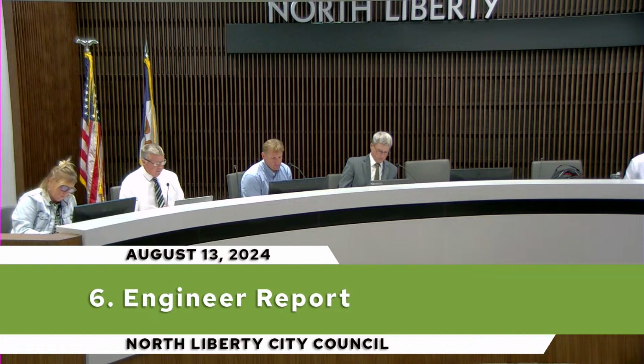The streets and maintenance facility building, the final walkthrough for a punch list is probably going to happen next week. So that's just about wrapping up. City staff has also walked through and has their own list of things, and the contractor is taking care of those. Forever Green Road signalization improvements is also underway.